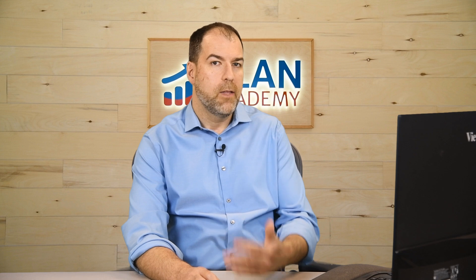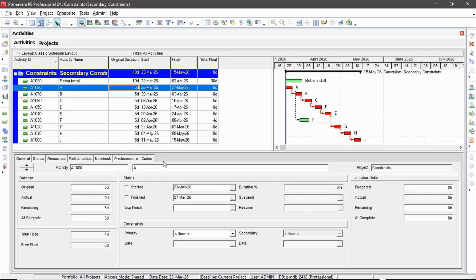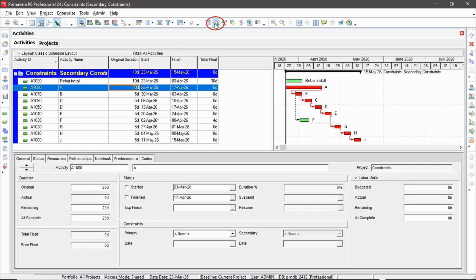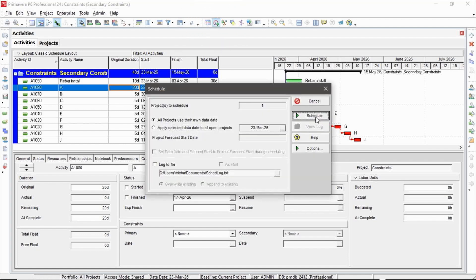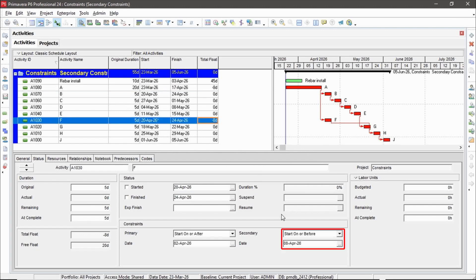Let's force it outside of that range to see what happens. So if I go to activity A and I put 20 day activity, this should force things to be out of that range. So that pushes the whole project into the future. And you can see because I am starting well outside of the range of the 2nd to the 8th, I now have eight days of negative float here.